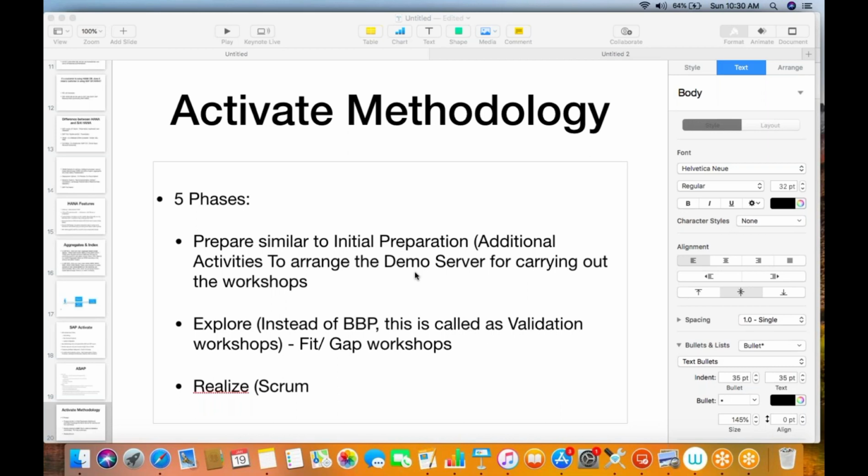So at least you can save the time. You can save the time of the carpenter also. Ultimately, carpenter's time is your time because after 3 months, if you come and tell, no, I don't want this, again the rework and again it will take more time, right? So what is a better approach is in Scrum, we are involving the customers on day-to-day basis. We are taking regular feedbacks. We are showing them whatever has been developed. Instead of showing everything after 3 months, we need to show them whatever you have done on day-to-day basis. And if they have any feedbacks, if they want anything to be changed, it is too early. Customers can tell you there itself, which means you can save a lot of time.